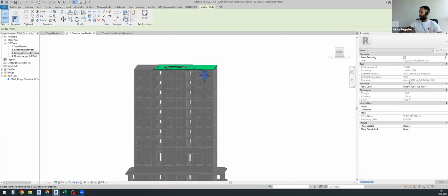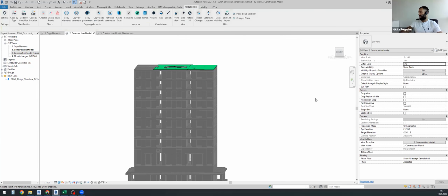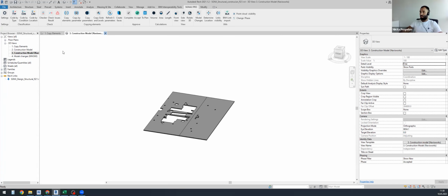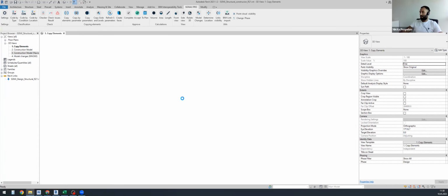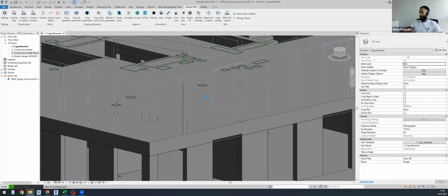EE2-DE2. So this information can be exported to a list as an Excel document, and we can filter and group the elements that are stored inside a specific location of the BIM model and calculate the scopes according to this information. This was an example with the structural BIM model. The same workflow can be implemented for the MEP BIM models. Let me load this example of the plumbing construction BIM model.